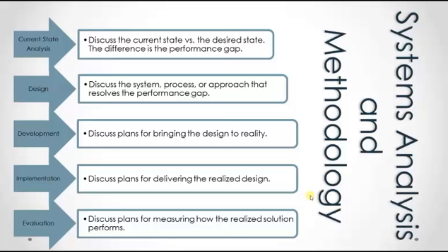You are free to choose a model that suits your project. If it is a customized or adapted approach, you must first explain it. If you make a straightforward adoption of another framework, like the systems development lifecycle, then you can simply explain the conduct of your project according to its phases. For the proposal, you'll provide the most detail for the initial phases, analysis and design, providing only plans for the later phases, development, implementation, and evaluation.